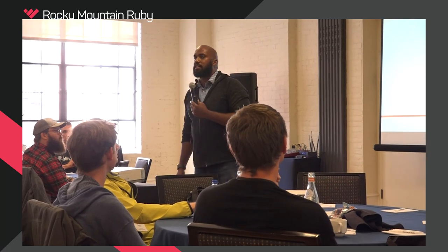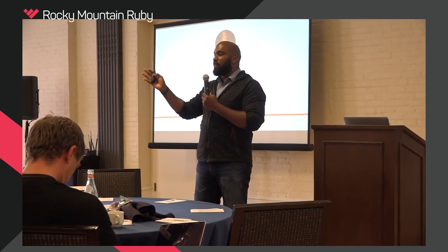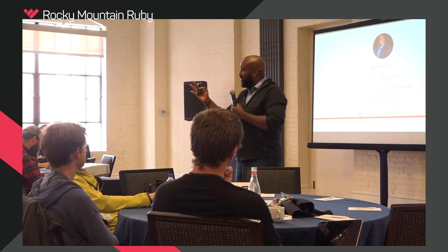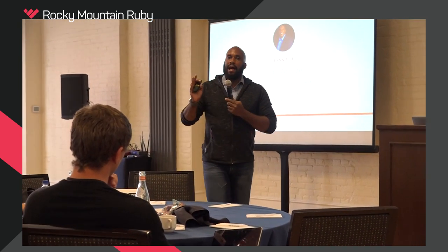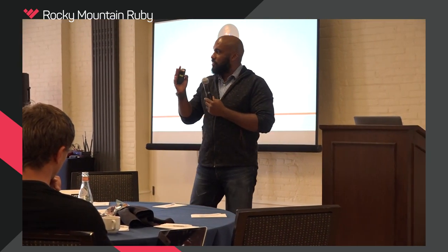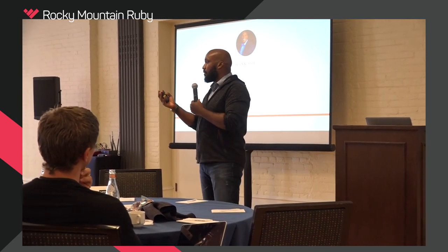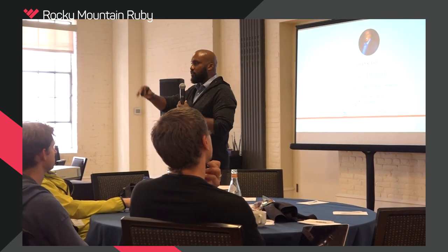Great question. So the question is, Kanban or Kanban? I've heard people pronounce it different ways or both ways. So Kanban, if you don't know, you have the Kanban board, and you are really flexible in doing it. In Agile, we measure velocity and things like that. In Kanban, you basically measure flow and cycle time and all that stuff. And so the idea is that you have a board that work flows across. Usually, if you're the team leader, the idea is to optimize flow, which is usually removing obstacles from your team. So that's kind of Kanban versus Scrum.